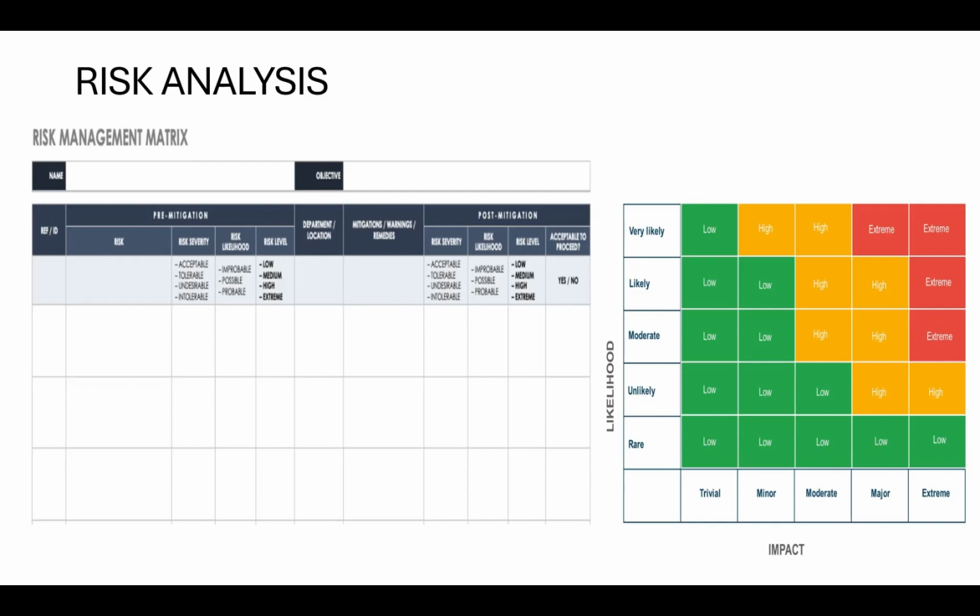Trusted servers. And even when we're using trusted servers or trusted services, we also look for an alternative. Yes, a backup plan. You can have a risk that if the physical structure where we are keeping the database, maybe the system, gets spoiled or packs up or is stolen or burnt down, that is a risk.